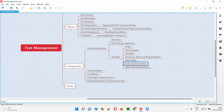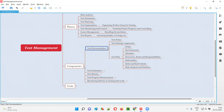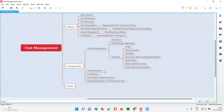The STLC followed by this project — for each and every phase of STLC in this project, what is the entry and exit criteria. Risk analysis and solution — what are the probable risks in this project and what are the backup solutions when they are encountered. This is the test documentation we do as part of test management.